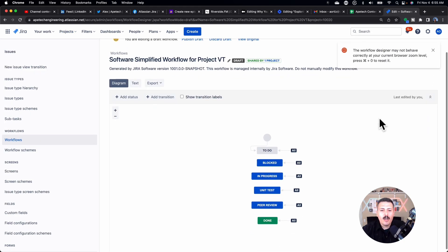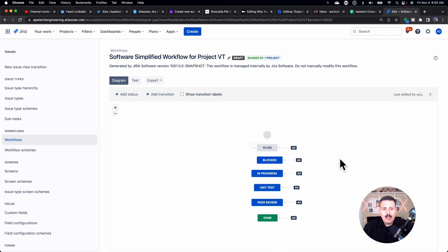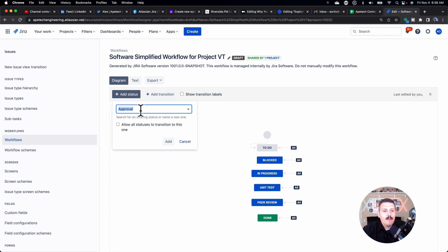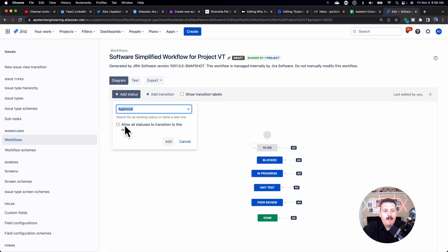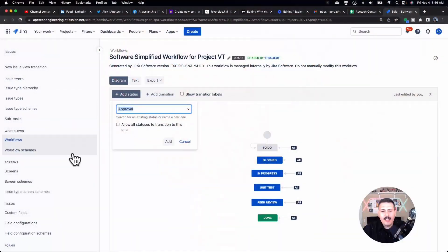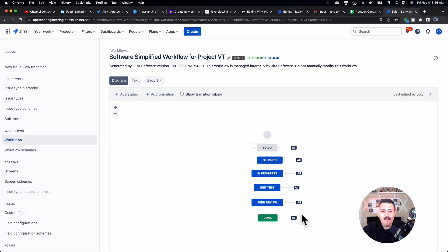Now, this particular workflow has already been created and it already has the right statuses, so I'm just going to show you how to add a status, but then I'm going to focus on the statuses that you need to have. To add a status, all you do is click over here to add status, and then you type in the name of your status and click the little checkbox to allow all. Now, this is optional. You don't have to do it, but if you check the checkbox that says allow all statuses to transition to this one, this is basically going to add this little all, and what that means is any status can go from any status to another status. I like it. It requires your team to have a lot of trust, and if you don't have that trust and your team does need that hand-holding, then I recommend that you explicitly call out the transitions, but be aware that this can hurt team morale, but your mileage is going to vary. In this particular example, I'm just going to leave everything as all, and then I'm going to talk about the statuses that we need.